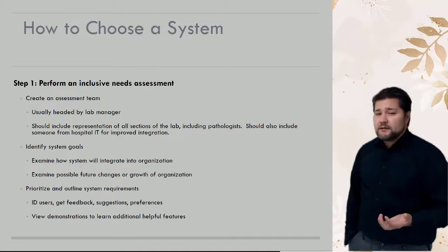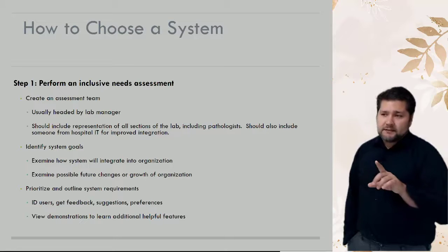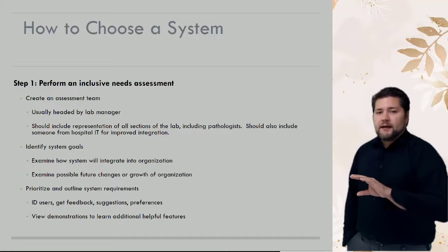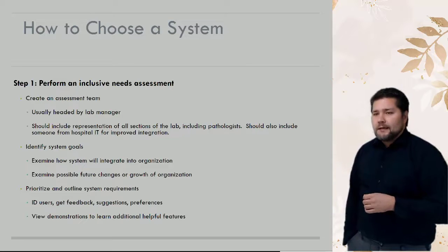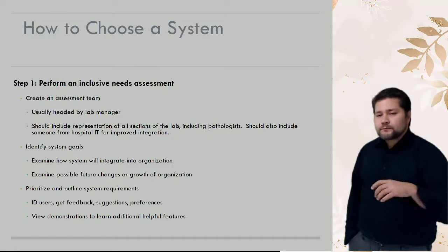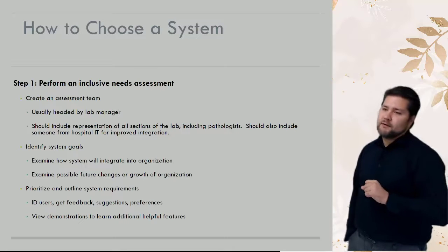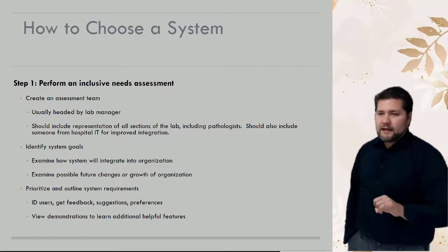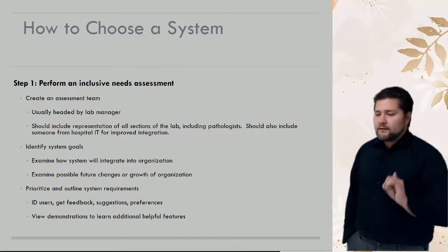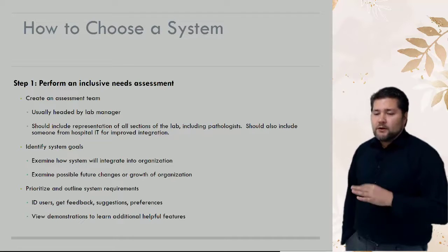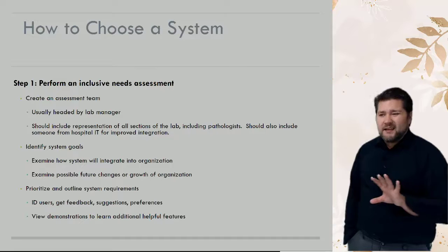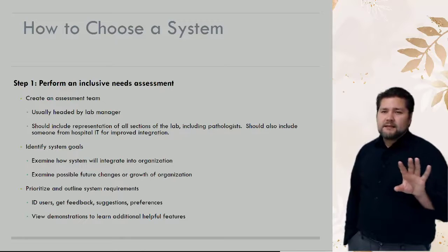This will include representation from all aspects of the lab, histology. So in the context of this, side note, assume this is an LIS that we're trying to get. Maybe we want to upgrade from WindowPath to CoPath. So let's get everyone who's going to use this system involved. That's going to be the surg path techs, the PAs. We'll get one PA, one histotech, maybe the histotech manager. We'll get a pathologist, all people who are going to kind of know the ideas of what this system should do.